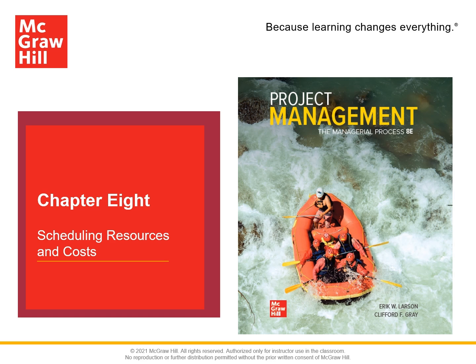If all projects and their respective resources are computer scheduled, the feasibility and impact of adding a new project to those in process can be assessed quite quickly. With this information, the project priority team will add a new project only if resources are available to be formally committed to that specific project.